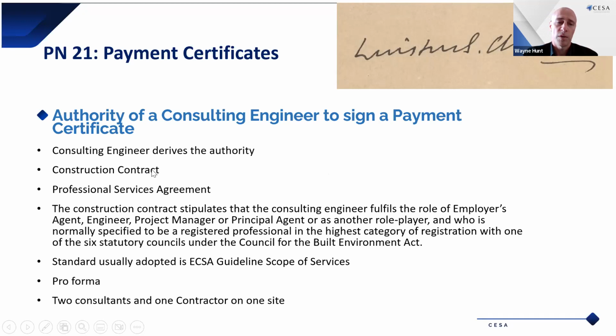There's also a professional services agreement which exists between the employer or the client and the consulting engineer. And this will define the terms of how the payment certificate must be compiled. That's very important because there might only be certain aspects of the payment certificate that are delegated to the consultant. In certain cases that has been the case, but your professional services agreement will stipulate that.